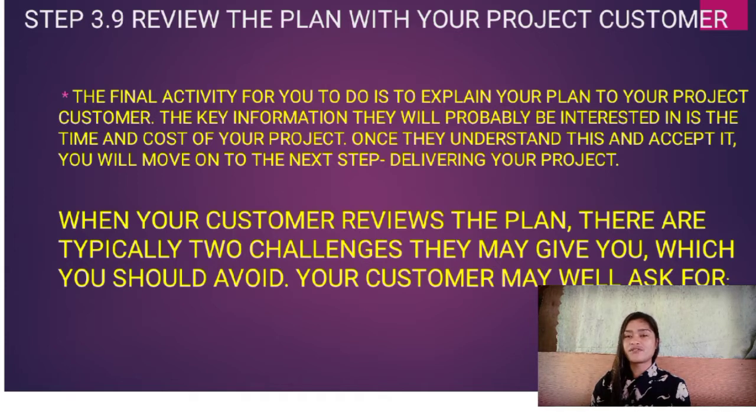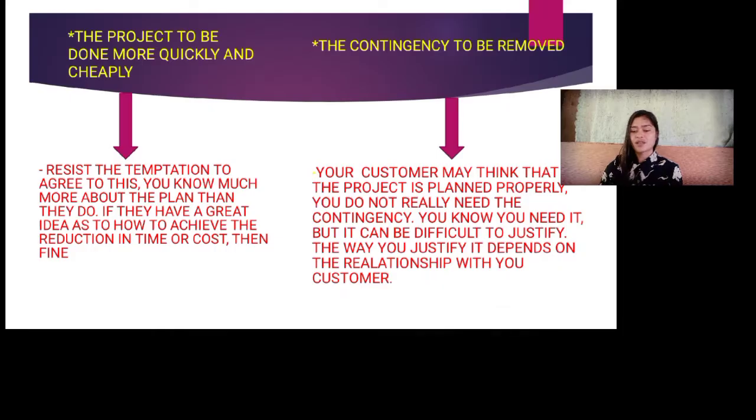When your customer reviews the plan, there are typically two challenges they may give you, which you should avoid. The first is your customer may well ask for the project to be done more quickly and cheaply. Resist the temptation to agree to this. You know much more about the plan than they do. If they have a great idea as to how to achieve the reduction in time or cost, then fine.